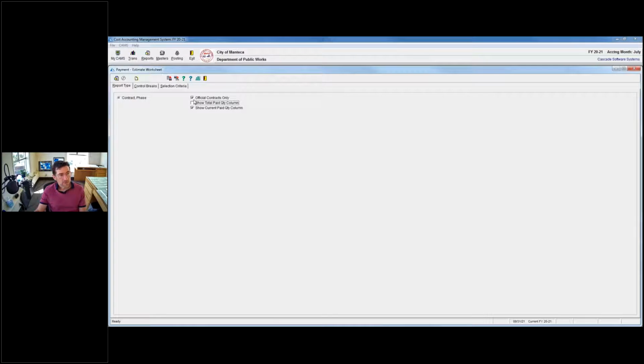Meaning, do you like to talk about the total the contractor has done on each line item, or do you want to talk about, well, I know that since last time we met, you've done another 150 tons or 150 feet or whatever. So I'll stick with total paid, and then run this worksheet.